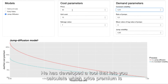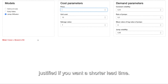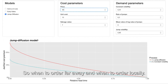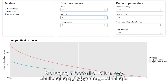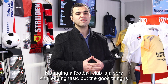He has developed a tool that lets you calculate which price premium is justified if you want a shorter lead time. So when to order far away and when to order locally?